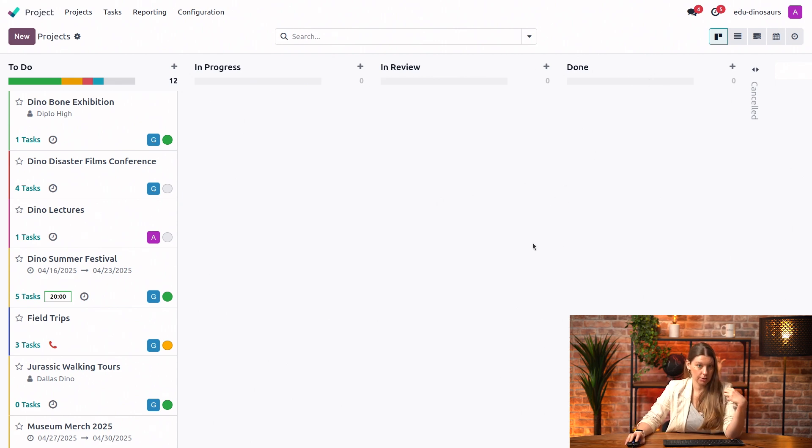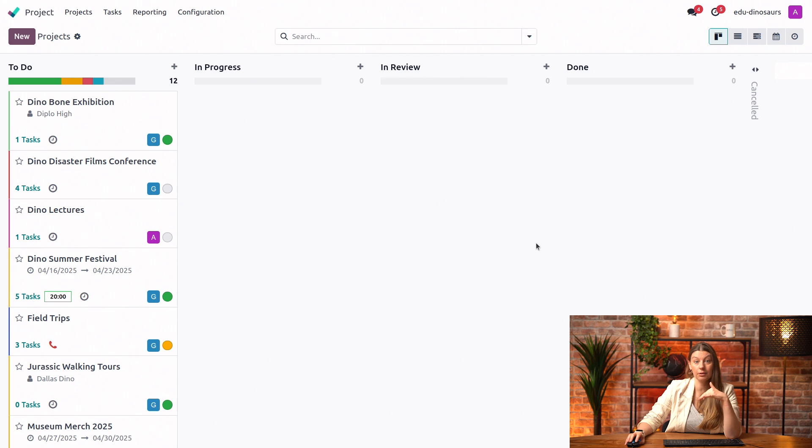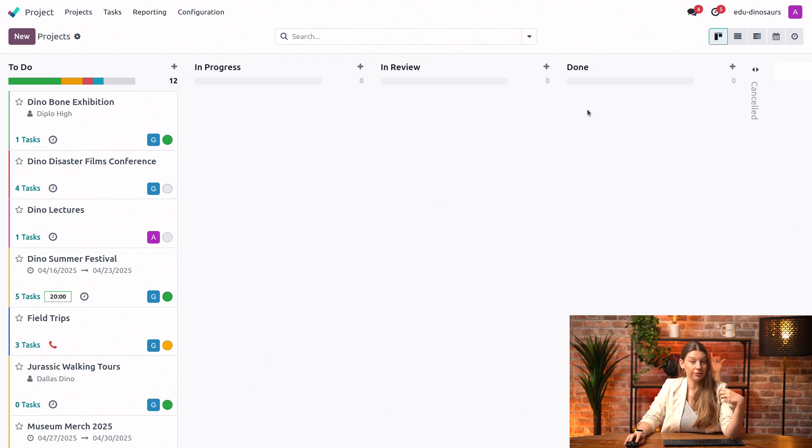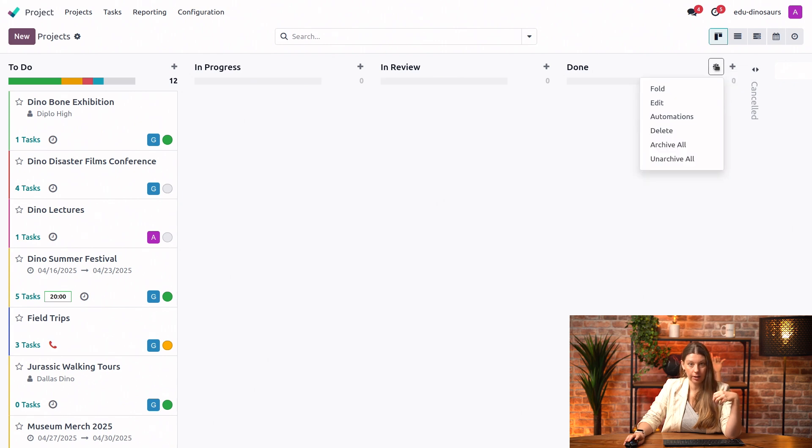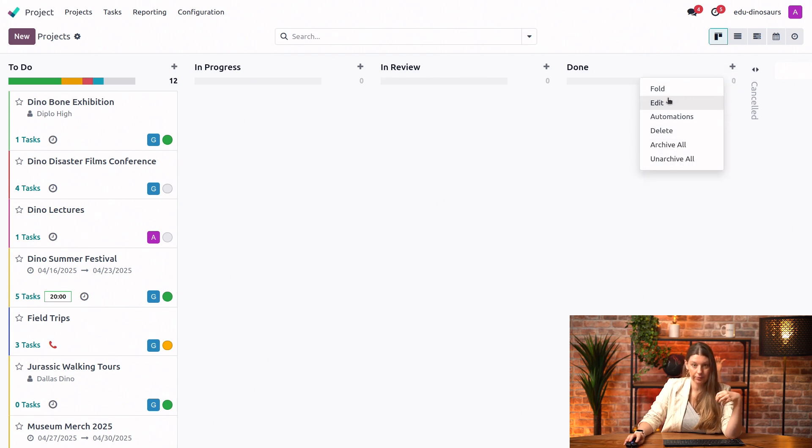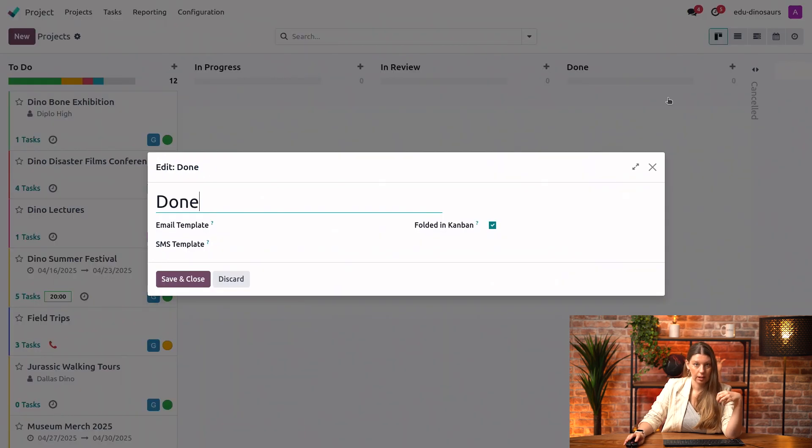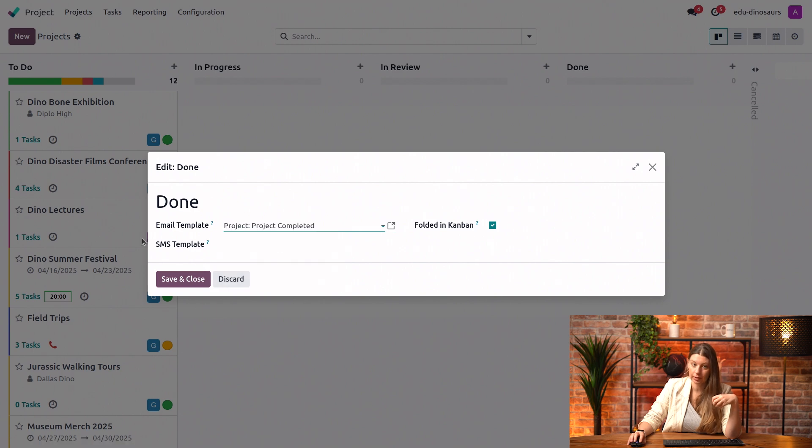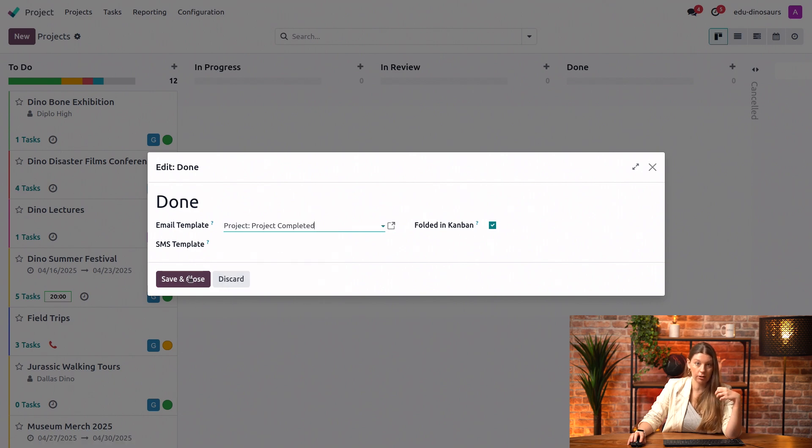All right. Another thing that I can do is if I want to notify the client when a project reaches a certain stage. For example, here with the done stage, I could just click on the gear icon, select edit. And I can set up an email or an SMS template. For example, this one here saying project has been completed and save and close.